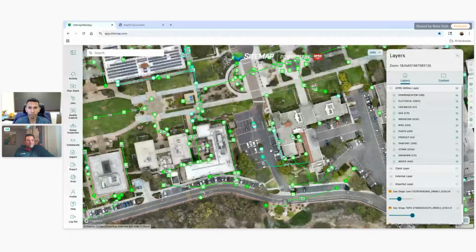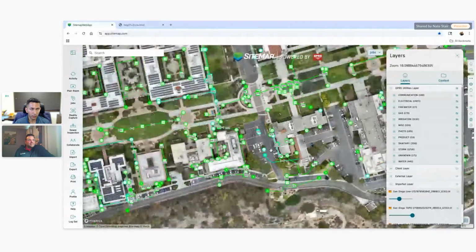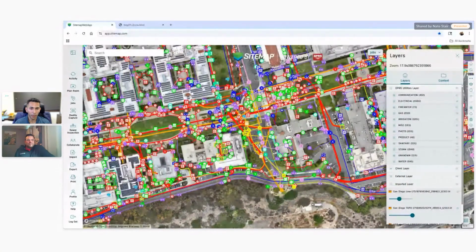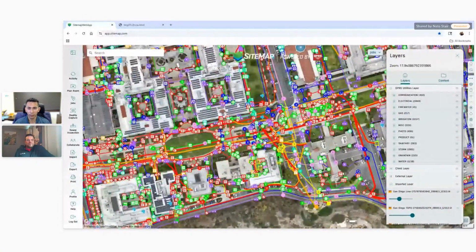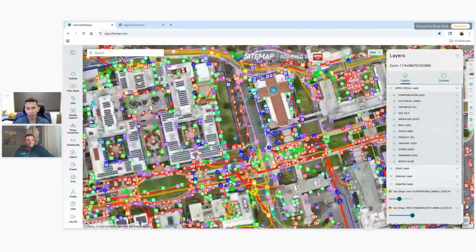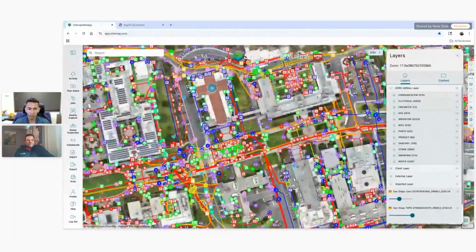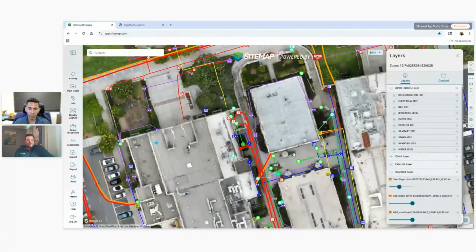That's really exciting. Do you foresee that continuing to happen as you go along with these projects? I think so. A lot of it's savings in the sense of, not value engineering, but just being able to identify some items on the front end. Going back to that elevator pit example, if we would have had to move the conduit for the elevator pit, it probably would have been a decent amount of money to get it moved out of the way. And on our campus, for example, we have our own grid. We tie into the main utility here in the city, but after that point, it's our own grid.